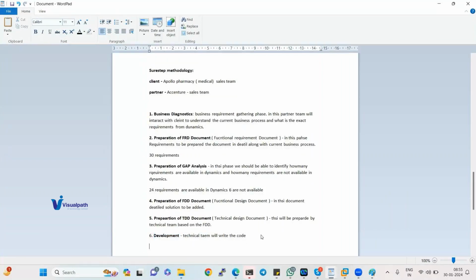It depends, right? If it is a very big requirement, they will charge it on an hourly basis, okay? Developers will say, I need 48 hours. They will inform the manager that to complete this requirement, including testing, I need 48 hours. So 48 hours is nothing but every day 9 hours, 5 days they need to finish the work, excluding holidays or week offs or something.